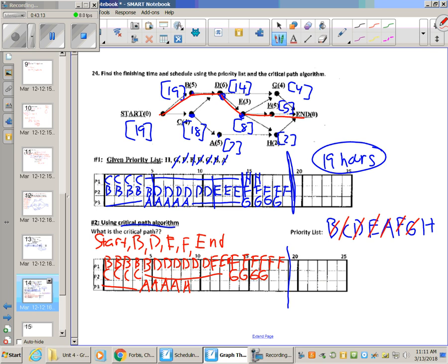And then lastly, for H, H's only prereqs are E and A. So as long as it's past A and E, we're good. And again, that's at hour 13. Or is that hour? Oh, I'm sorry. I read that E as an F. This is an E. These are F's. So it's actually right here. All right, yeah, past this point, those are 3 E's to the left, and 1, 2, 3, 4, 5 F's to the right. Okay. So again, H has to be past both E and A, so it has to be right here as well with a processing time of 2.